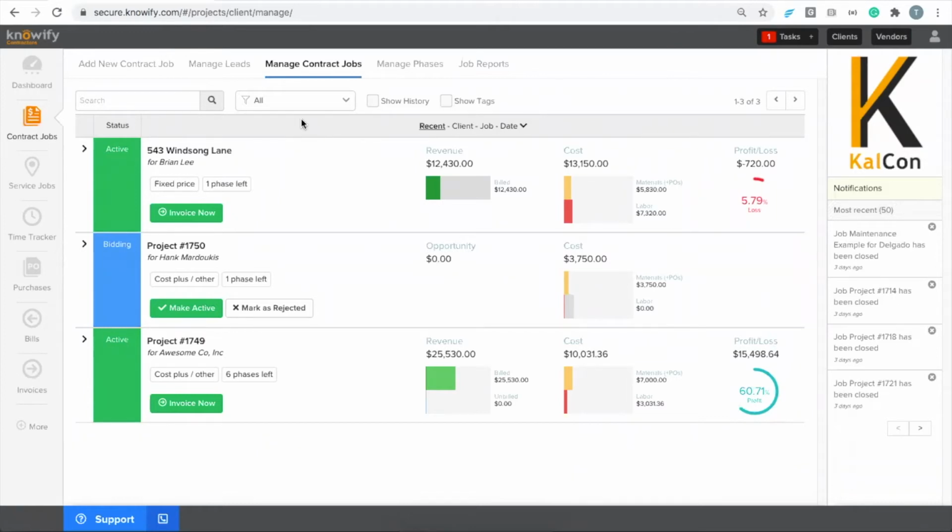A lot of people are familiar with the idea of progress invoicing, but what AIA invoicing is doing a little bit differently is telling a little bit more of the story beyond here's the percentage of the contract that we've invoiced to date. It's saying here's how much we're requesting out of our contract value, but here's also what we're requesting it for.